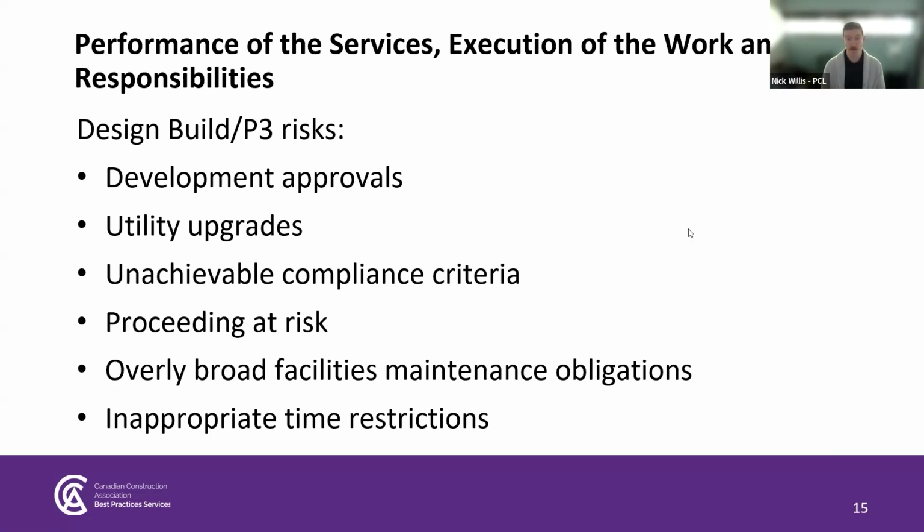Unachievable compliance criteria, for example, scheduled service commencement constraints or affordability ceilings, can make it difficult for proponents to submit compliant bids during the RFP phase. This can result in proponents having to incur extensive design development and other upfront bid costs before they are even able to determine whether or not their bid will be compliant. So some potential solutions for this include removal or relaxation of schedule and affordability caps, limited scoring implications for noncompliance rather than disqualification, and increased honorariums, or clarification that honorariums are payable even if schedule and budget constraints are not met.